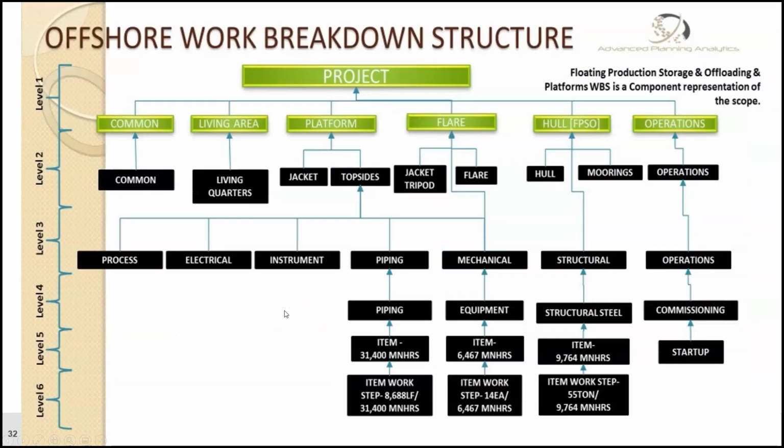This is a two-dimensional hierarchical overview of how the WBS cost breakdown structure is overlaid. Now notice I said cost, and yes, I did say WBS, but in softwares such as SAP or Ecosys or these other softwares, you're going to find that they use the terminology work breakdown structure, but it really aligns up with the cost breakdown structure.